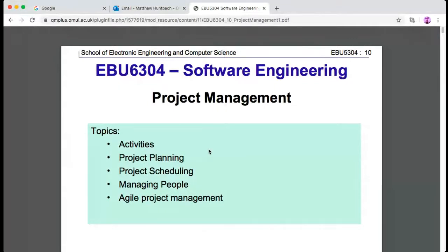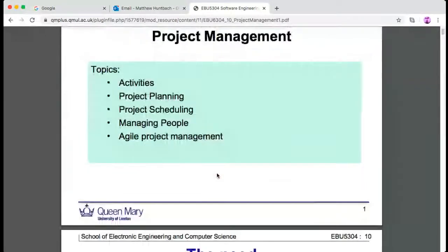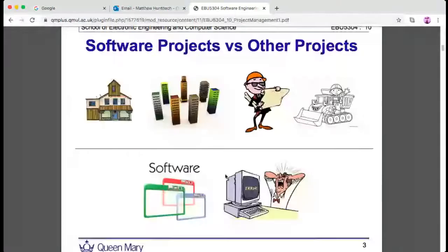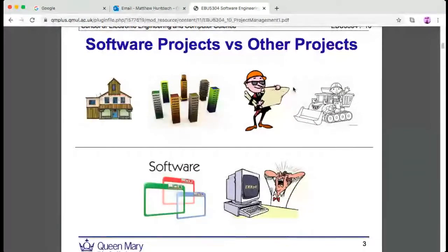Traditional software engineering had the idea, called the waterfall approach, that you would start off by doing all the requirements for the program, and detail what it should do, and then design it, and only then code the whole program, and then test it. That was the traditional approach. It was thought to be very good because you very carefully organize and design it first before you start producing it. Agile took it rather differently. The reason Agile did this is because if you design and produce code, it's very hard to know how long it's going to take and what's required.